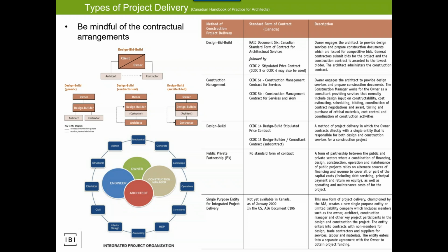But often that's a challenge. Now, IPD, integrated project delivery, is the best solution because the fears of liability, of being sued, are all gone. Owner, architect, engineer, contractor, and everybody else, we're all sharing and together. We're all contracted to work together. We share profit, we cover cost, we share risk, no finger pointing, no rubbish.